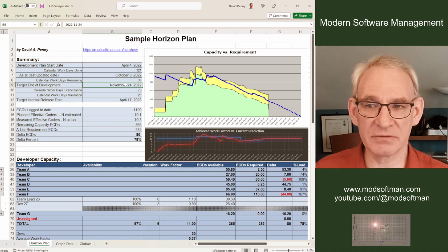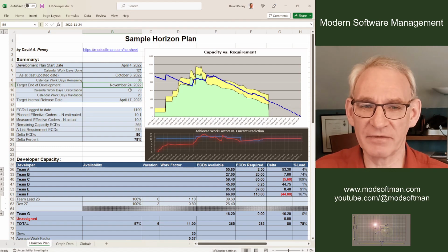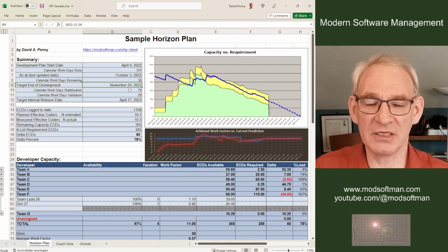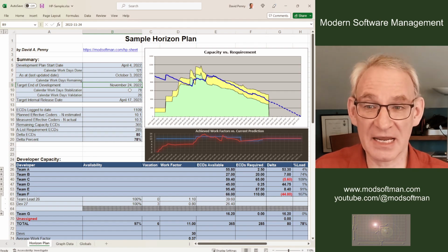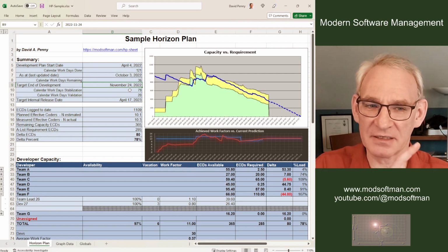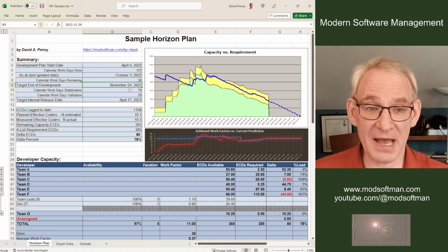After this date passes, when we do get into stabilization to validation, you're more in the back seat. You're observing defect arrival and departure rates. You're doing some active management. If you don't see enough defects, maybe you need to apply more test resource to it, or have devs do some more of the testing. If you see too many defects in a certain state, you make sure to motivate the developers to do defect fixing as a top priority, because some of them might be working on next release items, kind of getting a jump start on the next release. Pull them back and make sure that you clear the backlog with a certain priority. But you're a bit more in the back seat as this goes on.